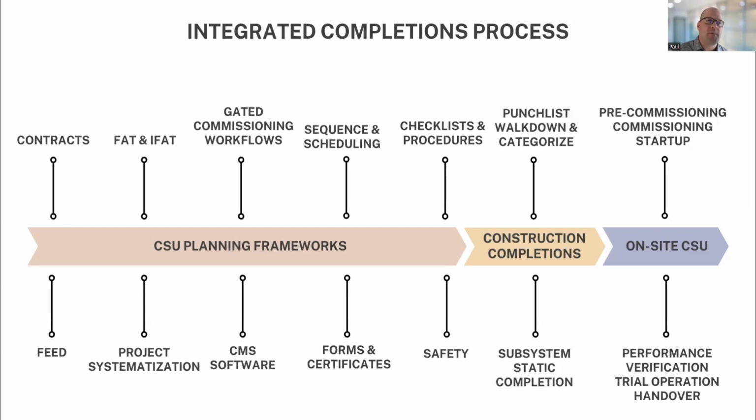This is where commissioning input is required. This is where our operations input is required to make sure that these lessons learned and feedback are being applied to earlier stages of the project so that we have what we need during commissioning from earlier groups that are preparing some of these design deliverables. And there might be some more detailed packages that require an even more detailed design review for some of our process control narratives or screens for HMIs that need a deeper dive from those that are involved in the project earlier to make sure that we have what we need later in the project during commissioning and operation.